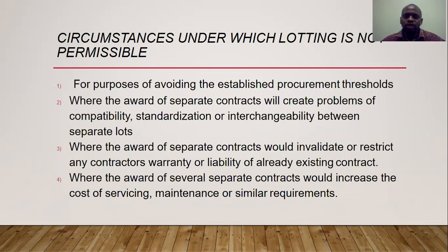use lotting. And where the award of separate contracts would invalidate or restrict any contractor warranty or liability of an already existing contract. So sometimes it becomes difficult when you're using lotting, because if the essence is to invalidate or restrict any contractor, then lotting is not the best option. And where the award of several separate contracts will increase the cost of service, maintenance, or similar requirements.